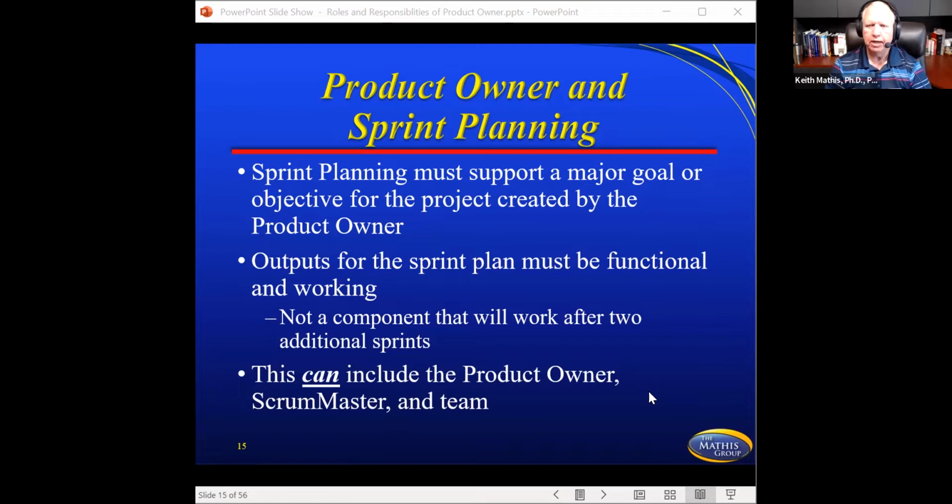The good thing about Agile is normally at the end of each sprint, you're handing something off to the customer. So that's a positive. You don't hand off half work. In other words, if I've got 25 features we're supposed to hand off and we got 22 ready to go, those 22 go, those other 3 don't go because they're not finished, obviously. There's no measurement in the Agile world really for partial work. It's either finished or not finished.